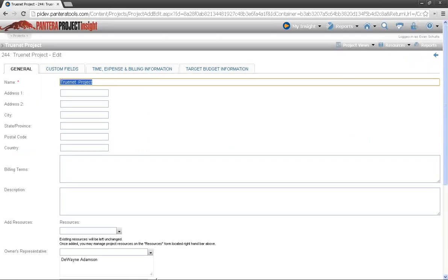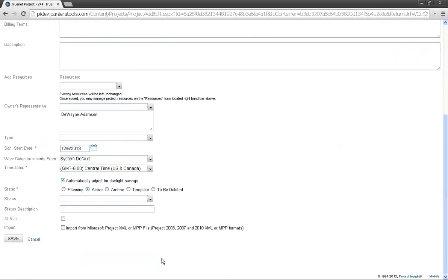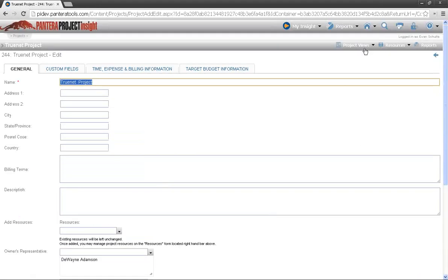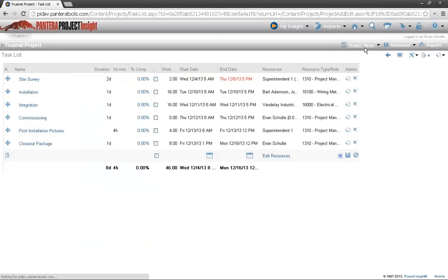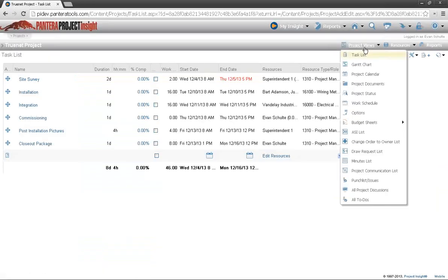Okay. But what they're proposing on this front is that you've got a template of work that you're going to be providing on each one of those sites. You're going to have task A, task B, task C. You're going to set up those tasks, and you're going to make a new site for each one based on a template. It's going to drag it in there, and you're going to rename where that site is, and it's going to already have all of your dependency tasks and all of the items that need to be completed on that site as part of that template.